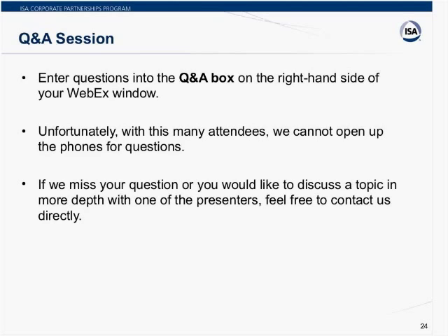And so you would want to put those CTQs together, and then as you begin to compare the platforms, capture that data for each of the platforms, each of the solutions, and then you can do a good comparison and make sure you don't miss anything. Again, part of the FEL process is making sure you don't miss a critical technical requirement that crops up later and costs you a lot of money. Right.